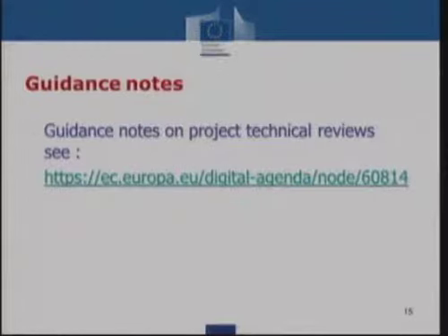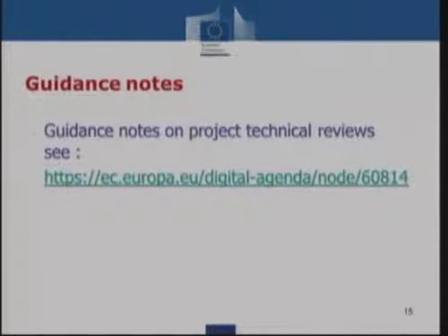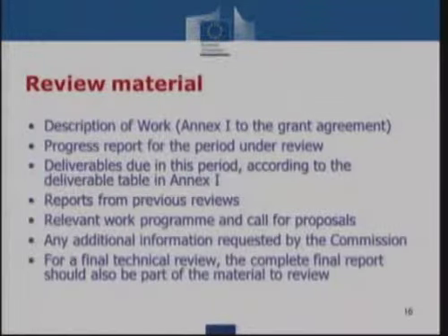So a review meeting also typically takes place for 1 day. It can vary between half a day up to 2 days for larger projects. And normally an outcome of the review should be communicated to you at the end of the review. We do encourage project officers, within 1 month after the review meeting, to send you the outcome report of the review, which is the Commission's decision, and it's also annexed by a review report, which is the consolidated report by the experts.